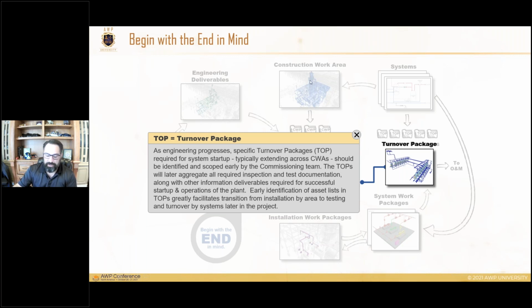We need to operate within that. We've got our engineering deliverables that, based on their deliverable dates, affect the schedule for the CWP. We've also got the procurement requirements that affect the schedule for that level 3 schedule activity that's tied directly to the CWP. So now we've got the CWP that's been heavily constrained and analyzed from multiple different locations. The schedule should make a lot more sense.